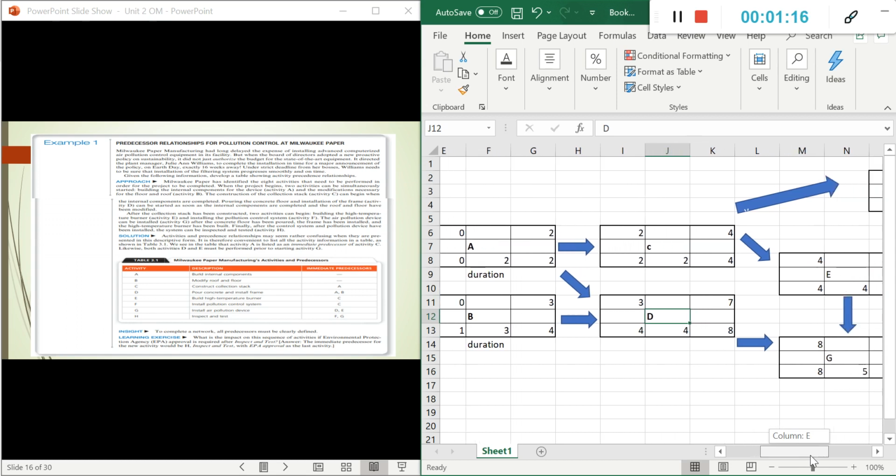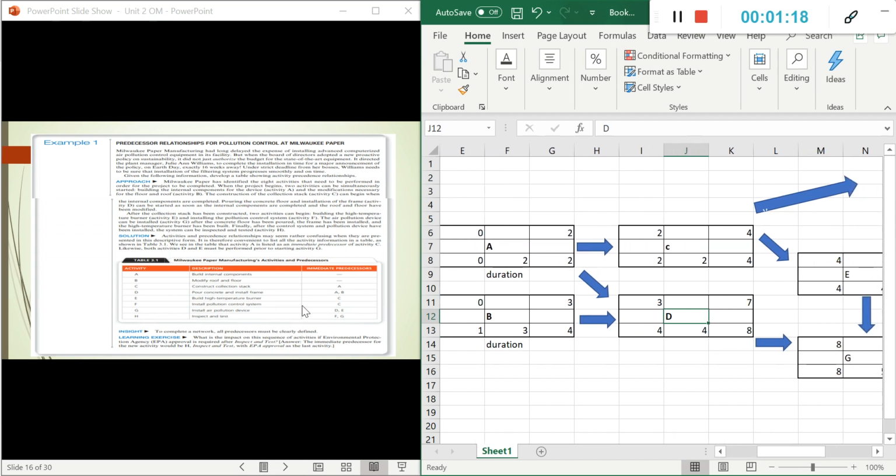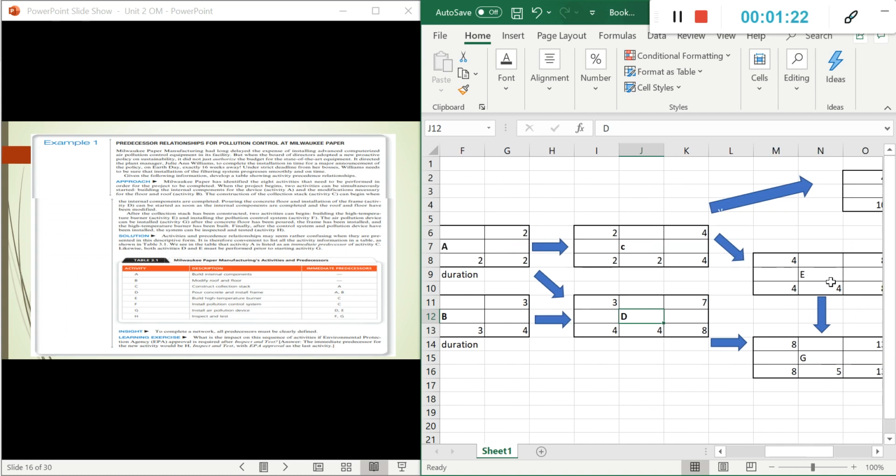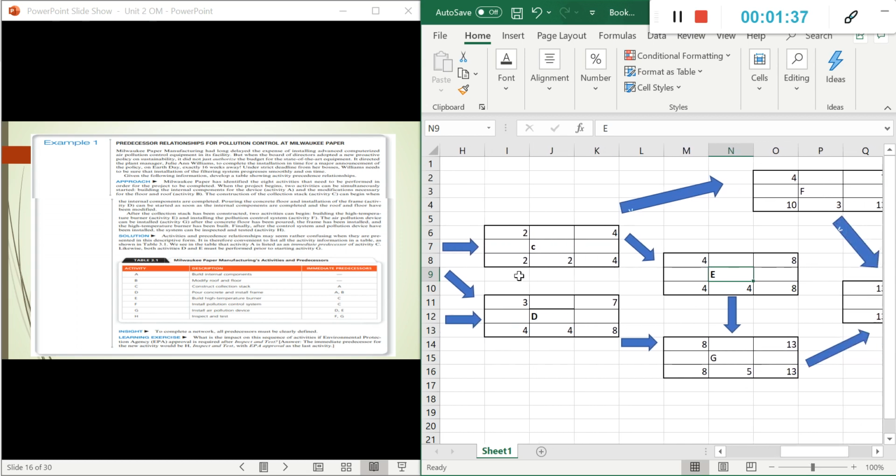Okay. So now let's see. The E has any predecessor? Yes, C. So here, that's why it's connected. E here. That's going center there. Then F has any predecessor? Sorry, we were going to F. F has any predecessor? Yes, C. So C. Here, F. Okay.